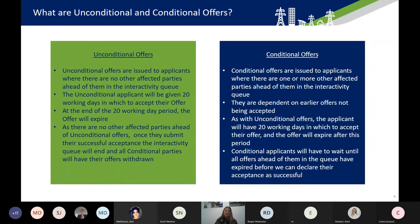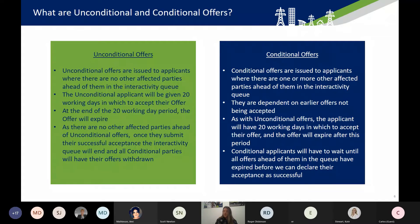Conditional offers will be issued to applicants where there is one or more parties ahead of them in the interactivity queue, and they are dependent on those earlier offers not being accepted. As with unconditional offers, the applicant will have 20 working days in which to accept their offer, and the offer will expire after this period. You will have to wait until all other offers ahead of you in the queue have expired before we can declare your acceptance as successful. The next few slides go into scenarios for what this would actually look like in practice.